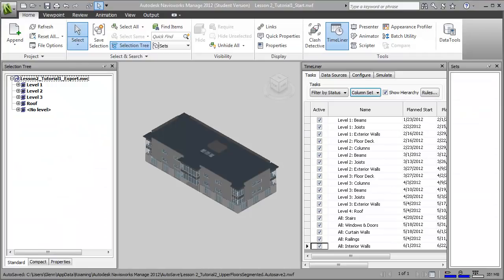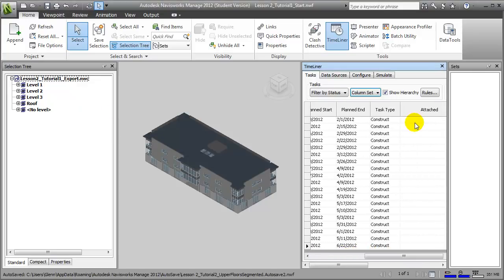Then we pull those two pieces together, integrating our building model with the task timeline in Navisworks Manage. The key to creating a 4D simulation of the construction process is linking the elements in the building model with these tasks, and we can do that by attaching individual elements or sets of elements to each of the tasks in the timeline. Creating these sets can be challenging, but it's really the key to working effectively within Navisworks Manage.